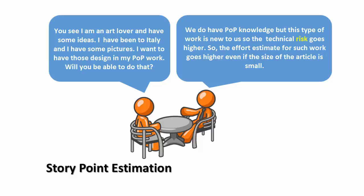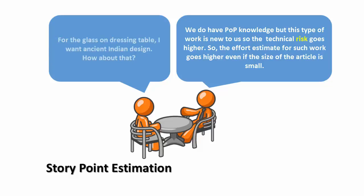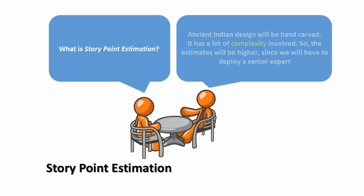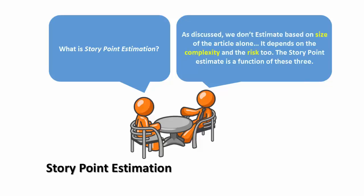For the glass on the dressing table, I want an ancient Indian design. Ancient Indian design will be hand-carved — it has a lot of complexity involved, so the estimate will be higher since we will have to deploy a senior expert. What is story point estimation? We don't estimate based on the size of the article alone; it depends on complexity and risk too. The story point estimate is a function of these three.